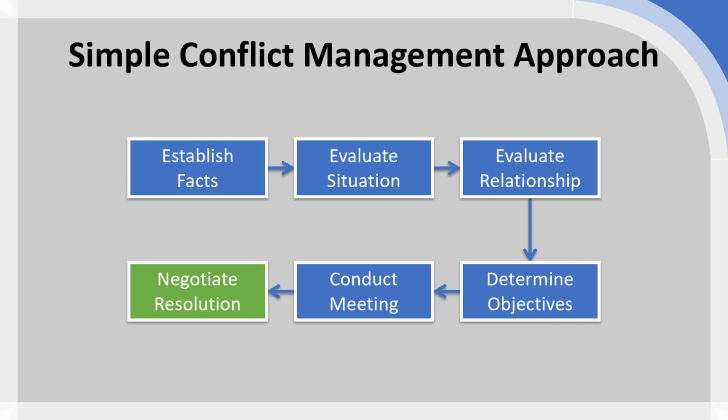So although this is a wonderful first step and always should be followed, simply because any escalation has an increasing burden and imposes increasing costs on both sides, and that's not just necessarily in terms of the performance of the contract. It can also have impacts in terms of cost, so financial cost, employee time, knock-on effects on projects and operations, leading to customer goodwill, and really could rapidly escalate. So ideally, you'd want to resolve disputes speedily, quickly, and effectively at the operational level. However, in many cases, an escalation to formal dispute resolution processes may be required.